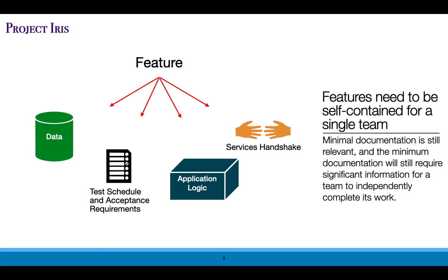I've managed a couple of projects following these same steps and business processes, although each time with different tools, different technology, and different subject matters. So as you're planning your project, expect that it will be different. You will need to create features that are fully specified. Having the data and service handshakes well understood before the teams start working lets them progress independently and avoid negotiating handshakes between components mid-project. This is especially true for the data science work, which is sophisticated and iterative. Features will have to be written as specifically as possible, and they will need to allow for significant testing and iterations to ensure the approaches defined by the data science team give the results they're looking for.